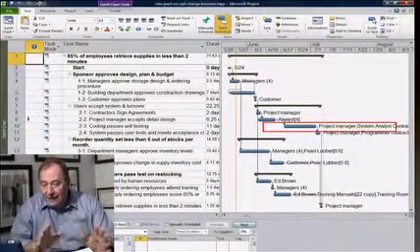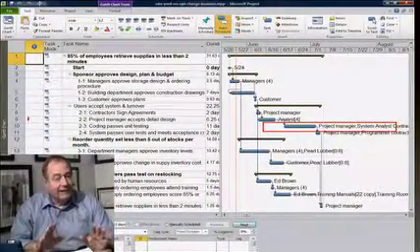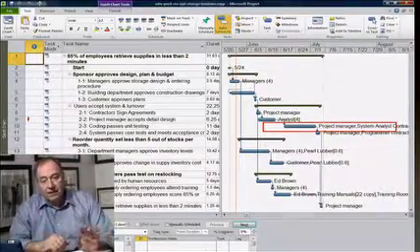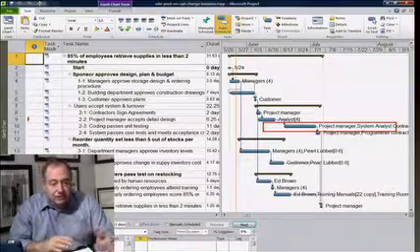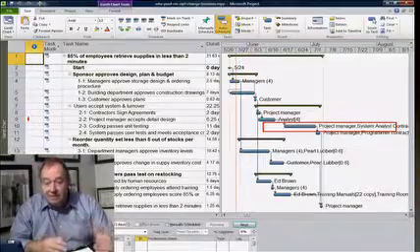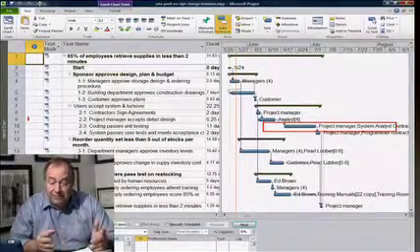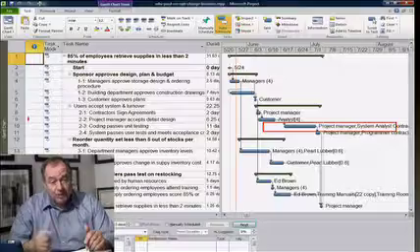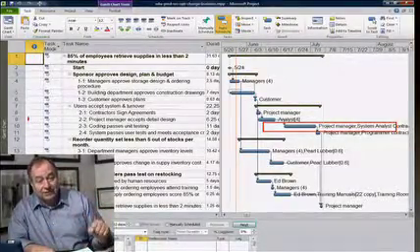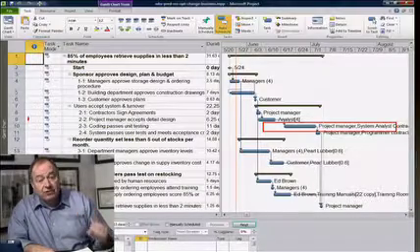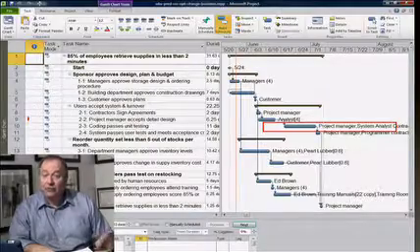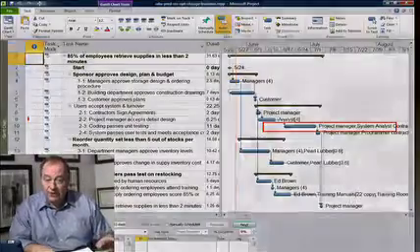Let's now look at our supply room project again and see the project manager's modeling of a change request. The PM received a change request for additional deliverables on task number 16. PM talked to the involved team member. They agreed on an estimate of how much additional work would be required. Then the PM entered that additional work to task 10, and let the software calculate the impact on the project completion date and the overall cost of the project.